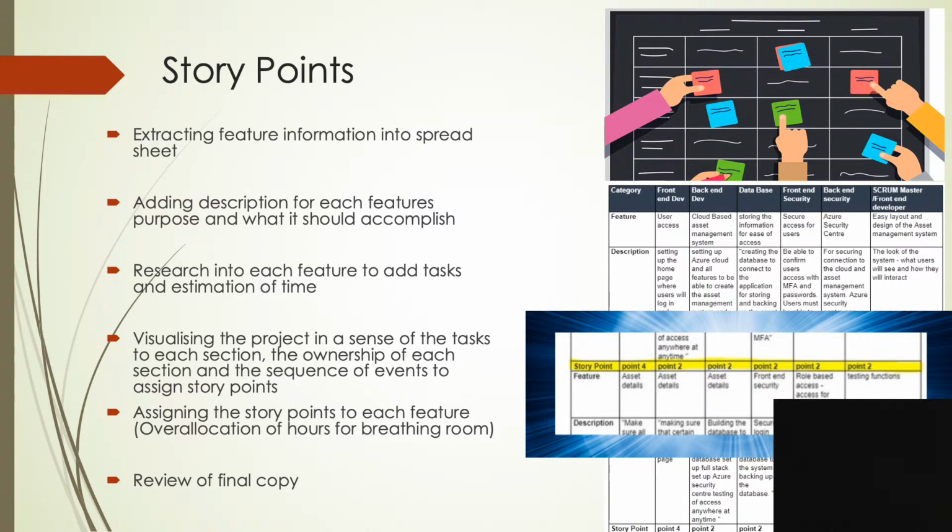We used our high-level overview and best judgment to assign story points to each feature. We took into consideration which aspects of the project, such as front-end features for user interactions, would be an ongoing task as it requires testing at each stage of the project and relies on all other tasks to be complete in order for that to be completed.